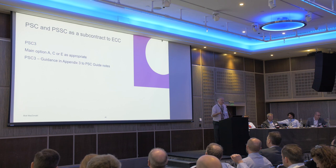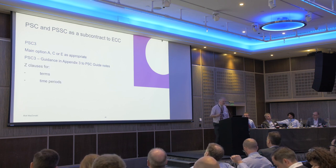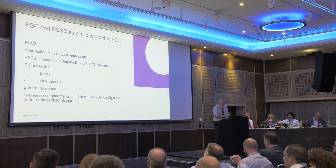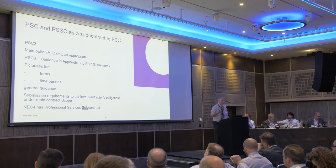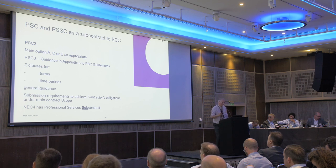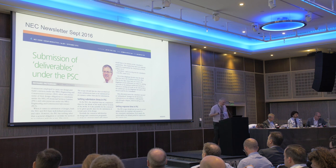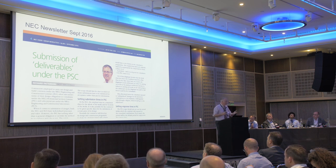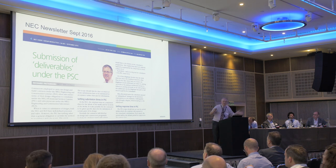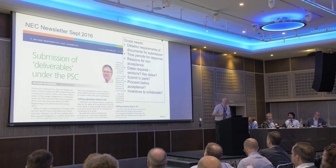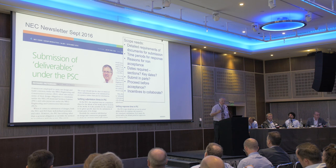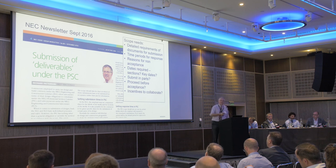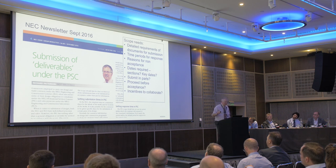Try to avoid putting in too many Z clauses in the PSC as a consultant on the receiving end. Typically Z clauses address time periods and similar issues. NEC4 now has an out-of-the-box subcontract. In ECC, contractor's design has particular design submissions, options to submit in parts, and clear time periods for review. In the PSC — nothing. So in the scope you're going to have to write out all those things: detail requirements for submission, time periods for response, reasons — all that stuff is in the ECC but not in the PSC. The only place to put it is in the scope.